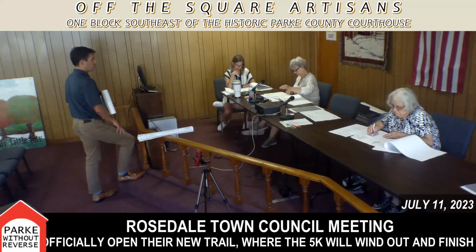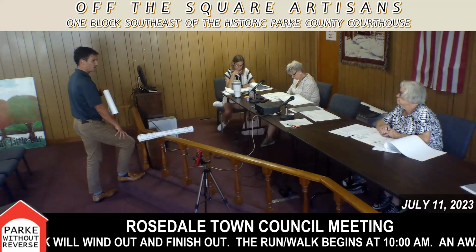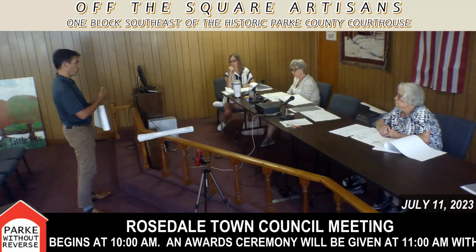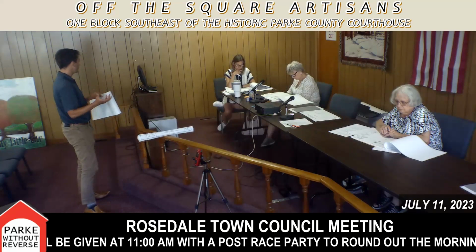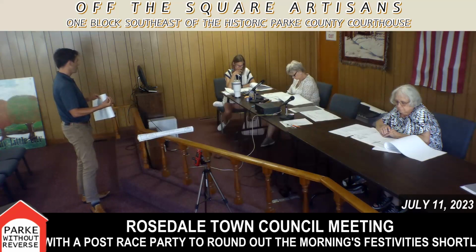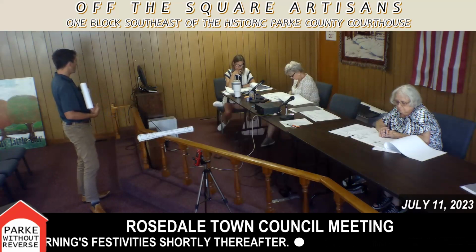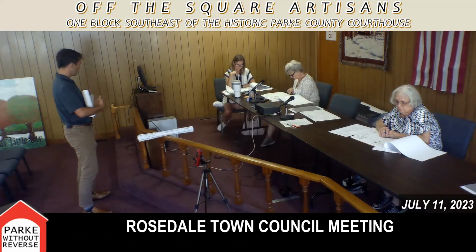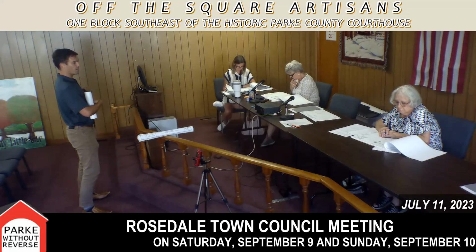Right. So the good thing about this is this storm sewer is a phased installation. So what you're getting right now is that trunk line through your outlet area, but only an 18-inch inlet hooked up to it so far. So at least in the current condition, it has no way for that water to get up that high. So as we add flow to this sewer, it's something to be cautious of that, in the future we want to keep looking for ways to reroute that sanitary sewer.